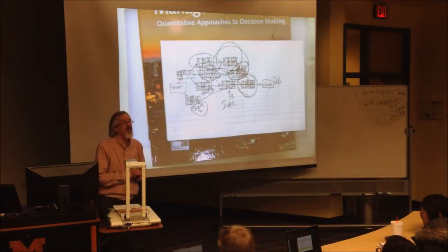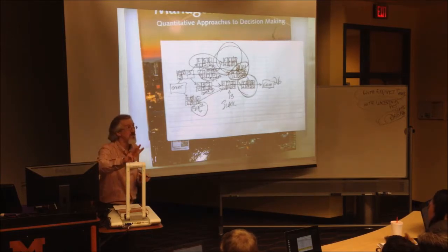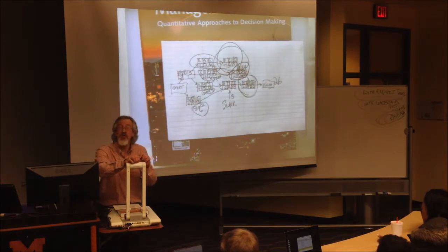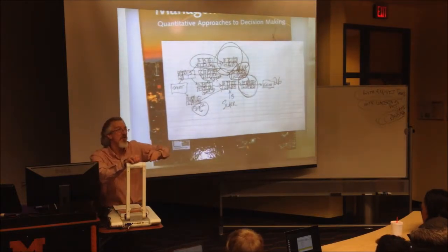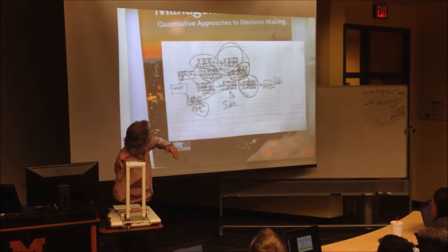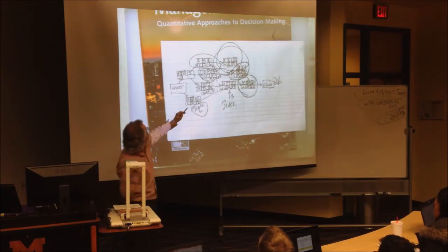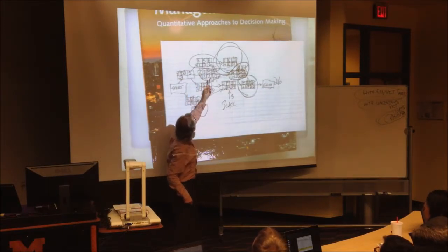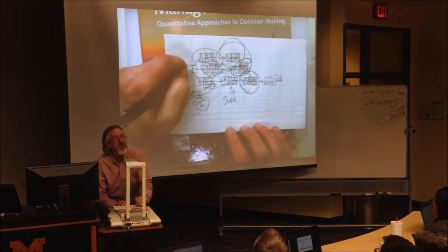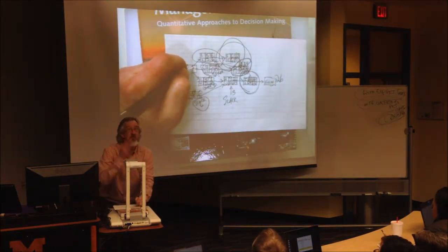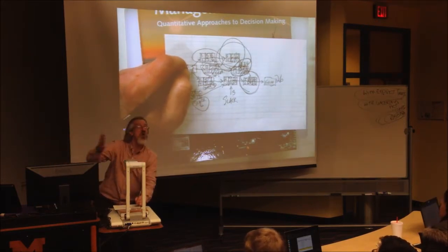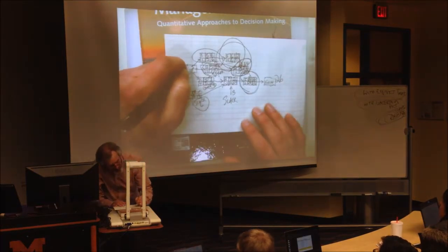Here we go with A. A has 3 activities after it. You got to look at the latest start for all 3 activities, and you should tell me which one would be the latest finish for A, without me telling you the rule again. Let me look at the 3 numbers. 5, 7, and 8. A, what number do I put here? 5. That's right, the smallest number when you're going backwards. Largest going forward when you have multiple activities before it. Smallest number when you're going backwards. So you got to put a 5 here.